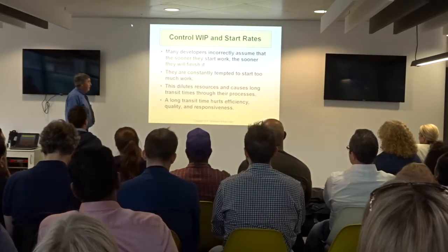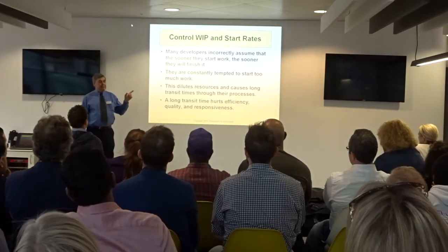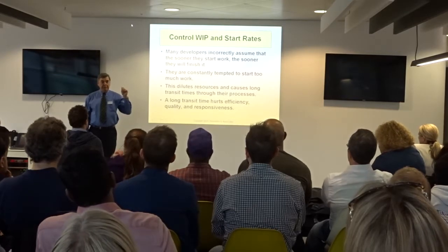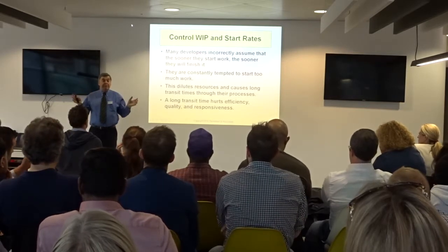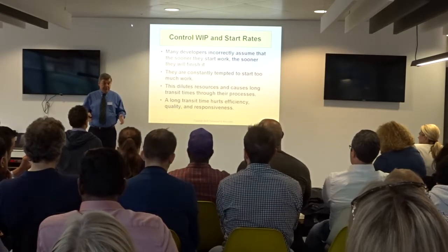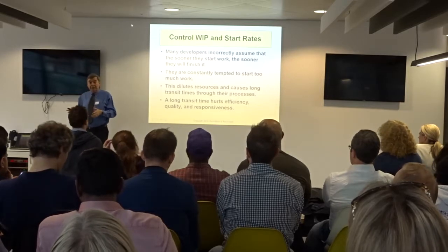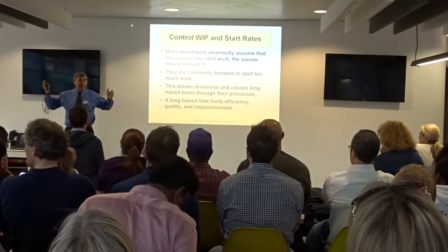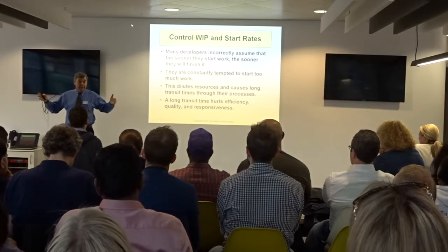I'd say there is a major management illusion where people believe the sooner they start work, the sooner they will finish. And this is just a huge misconception on the part of management. If an engineer becomes free for 2 or 3 days, I guess we have capacity to start another project, and at least we'll get some work done that we won't have to do later. The problem is the work is perishable. Anything that you have in flight is essentially a perishable item that is losing value over time.